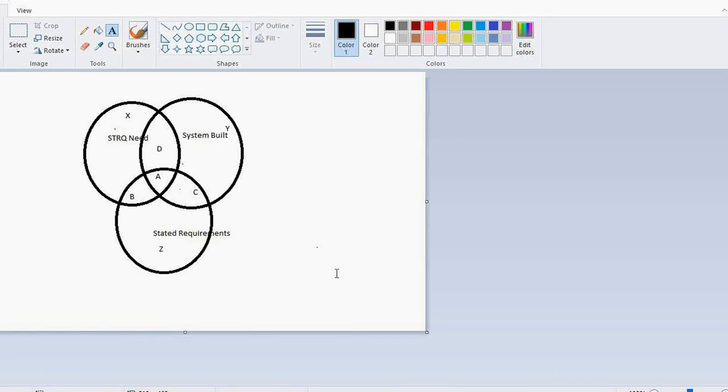If the answer is yes again, okay, then on the timelines, that's where you involve your project manager. You would go and talk to your project manager. Hey guys, we took the sign off. This is the date when they signed off on it, but they're adding a new feature or a new requirement now. So you are the one who manages the timeline. So they're saying that they're okay with the timelines. They're ready to extend the timeline.